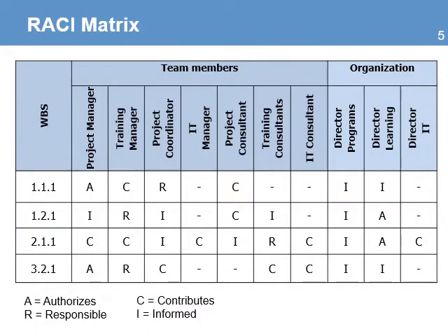The second tool that you can use is the RACI matrix. This tool is usually completed during the planning phase of the project, but during implementation, you need to review it and make sure that all activities have a person assigned as responsible. This also is a good time to evaluate if the team members assigned with the responsibilities have the skills and capacity to perform those duties.